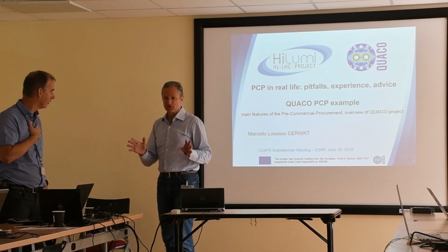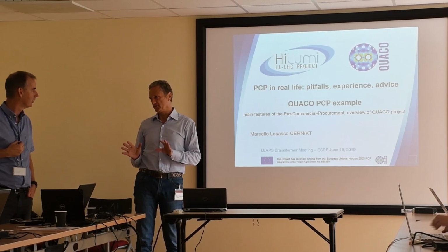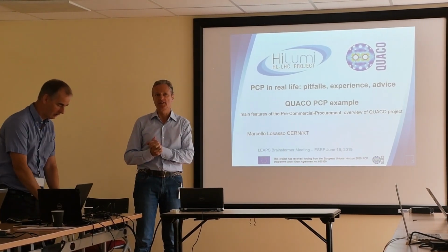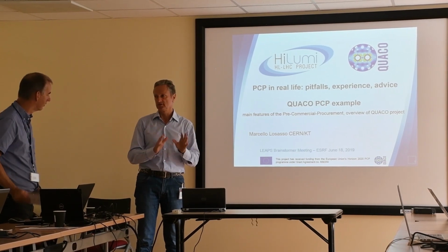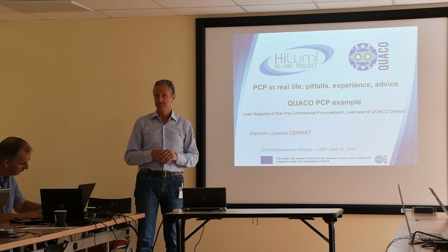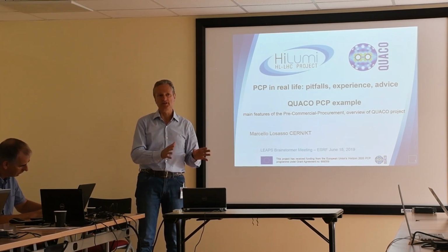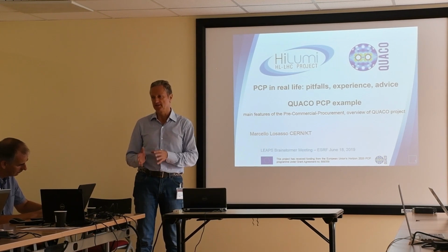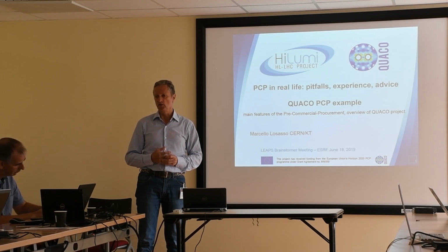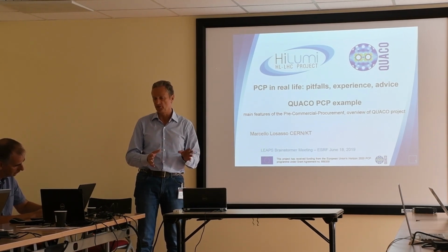Just to say something about specification. PCP will accept only functional specification, okay, which means you cannot go into the detail of how you go to some specific manufacturing or something. You have to leave the freedom to the supplier to choose the way. And this is one of the things that you are evaluating in the competition between companies.